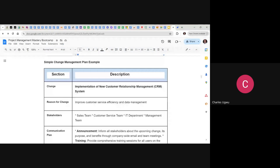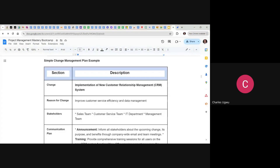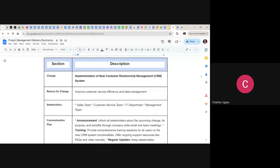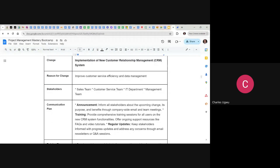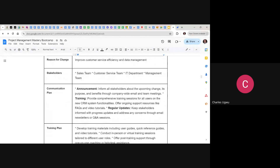The change in this example is the implementation of a new CRM system. They already have a CRM system but want to implement another one. We've stated the change; the reason for the change is to improve customer efficiency and data management. Then you need to state the stakeholders involved: the sales team, customer service team, IT department, and management team.